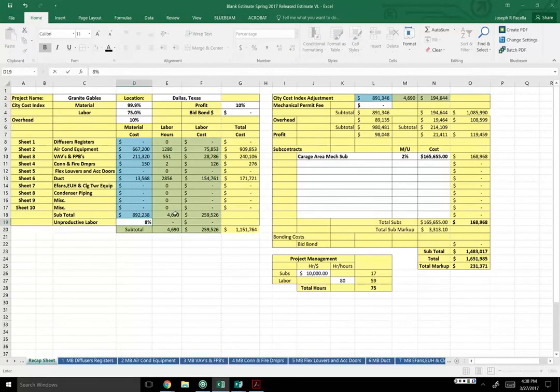If I do that, you'll see that so far we had 4,690 hours. That went up 375 hours to 5,065 hours. I'm going to take that back to 0 real quick. And I'd like you to notice here, in the assignment, I believe it said for every 10,000 hours of subcontractor, we're going to put in 1 hour of labor. And for every 80 hours of our labor, we're going to put 1 hour of labor in, of project management. That would be the guy on the job site.